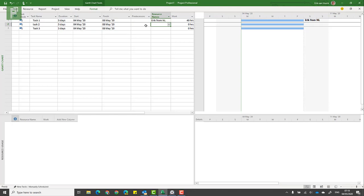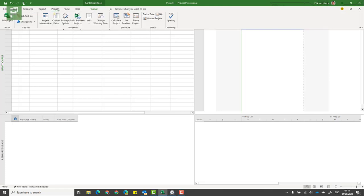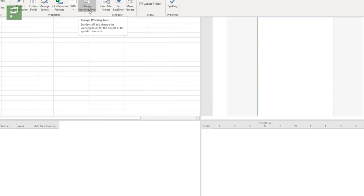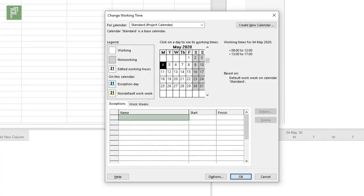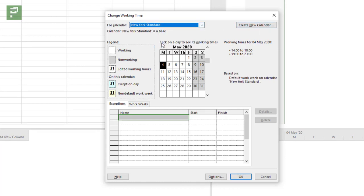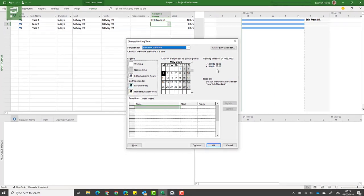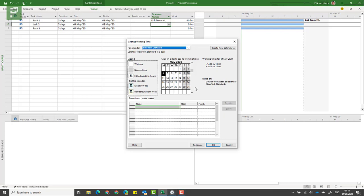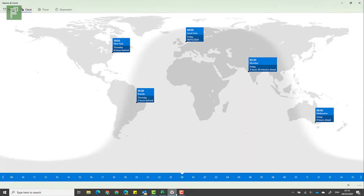I already prepared the New York time zone. How I did that is I went into Project, Change Working Time, and here you will see that I have a New York standard calendar. That New York standard calendar has the New York time zone already incorporated in it.